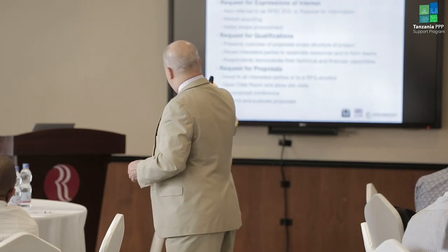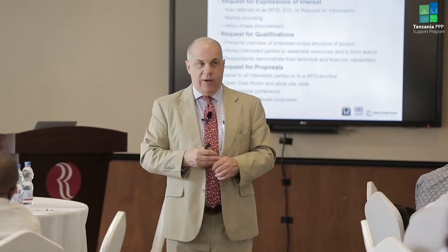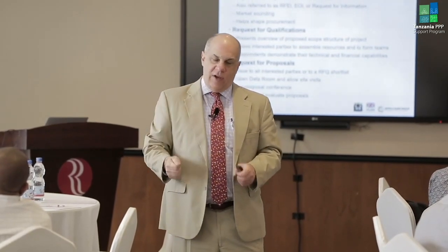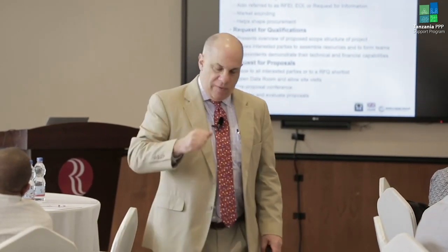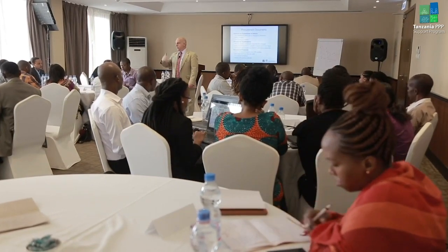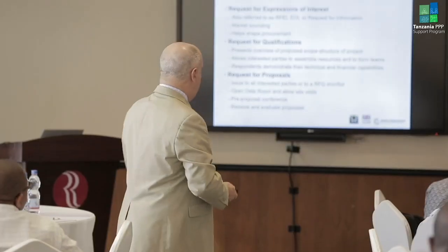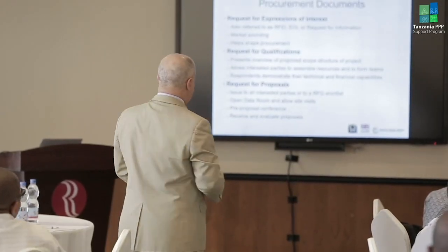And it's also very involved on your side, on the government side. The document itself, you will already have most of the information, so it's not an extremely difficult document to write, but you'll find that there's a lot more that you now need to provide. So like any of the studies you've done, you want to make available to them. You might have to give them tours of the site. We'll get into responding to questions they may have. So it becomes more labor intensive at this point.